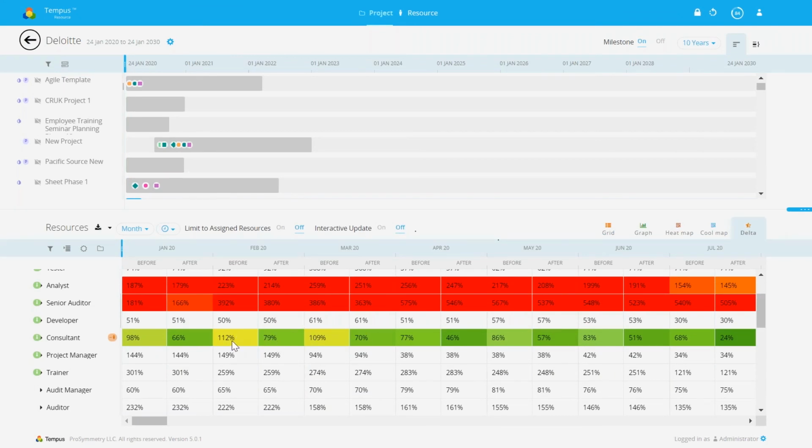Again, I was going to be over-allocated, or I was going to have too much work for the number of staff. So now I can live with that. So in real time, headcount reduction, we can always add back real quick. We can always reduce our projects. We can slip projects out. We can put projects on hold. Again, all of the things you're doing is communicating between your resource managers and your project managers, doing this what-if.